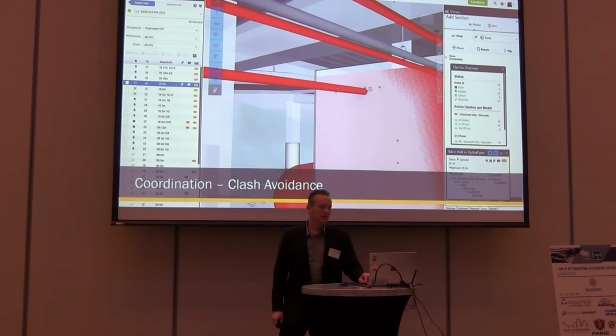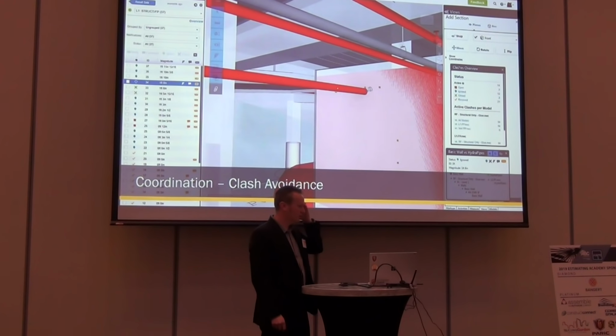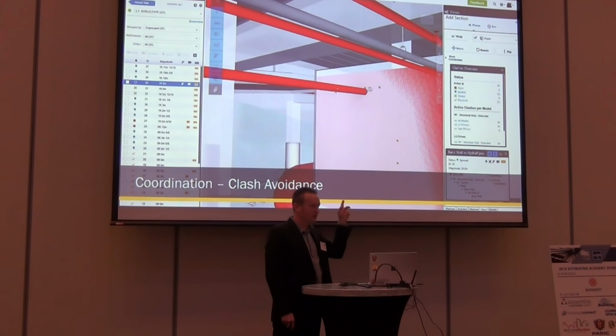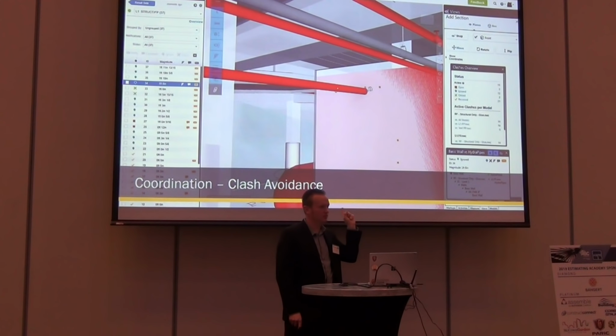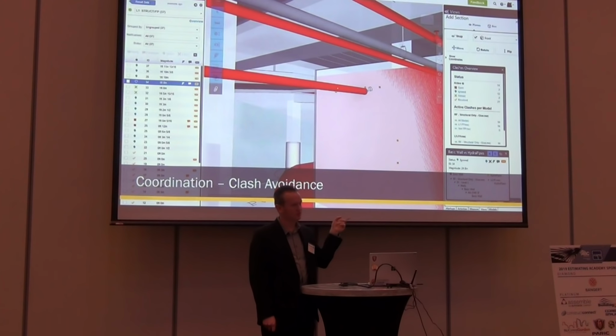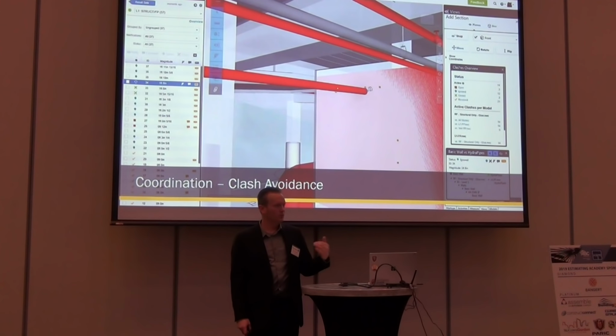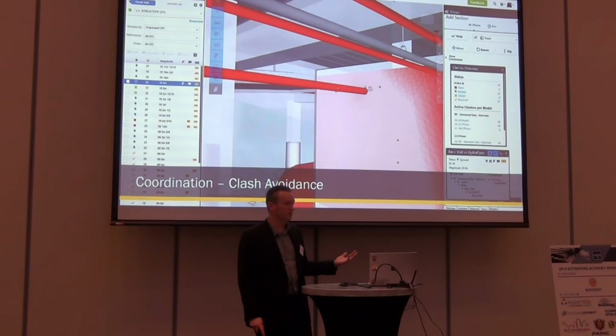So what you're seeing on the screen here, I know the setup already played, is this is cloud-based clash detection, right? So we're really trying to do clash avoidance, but we work together as a team. And so this gets updated on a daily, hourly basis by the project teams. We typically meet for about an hour every week and go through design problems that as a contractor we need to help work through.